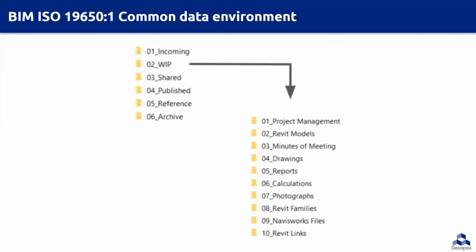So the advantages of adopting such a CDE solution and workflow include responsibilities for the information with each information container remaining with the organization that produces it. And although it is shared and reused, only that organization is allowed to change the content. So the shared information containers reduce the time and cost in producing coordinated information. An audit trail of information production is available for use during and after each project delivery and asset management activity.